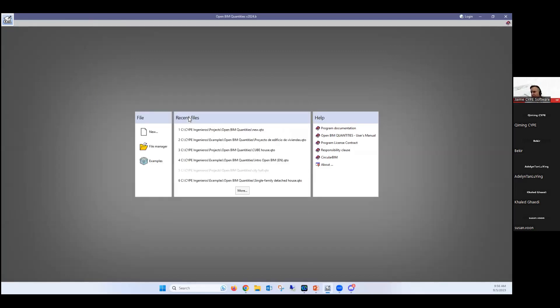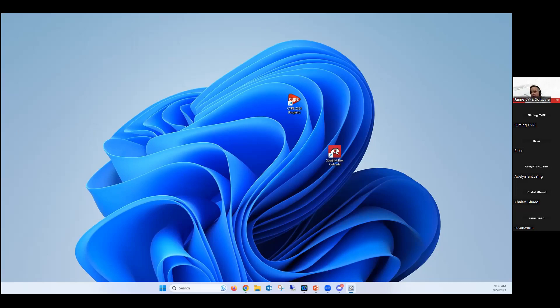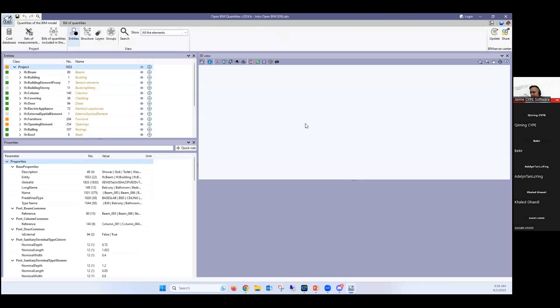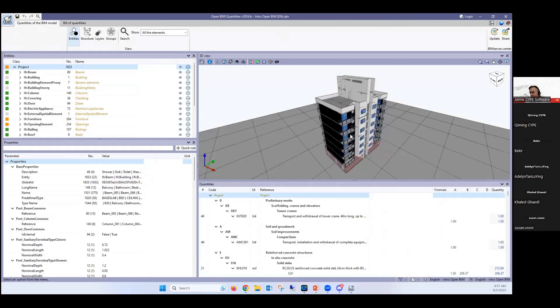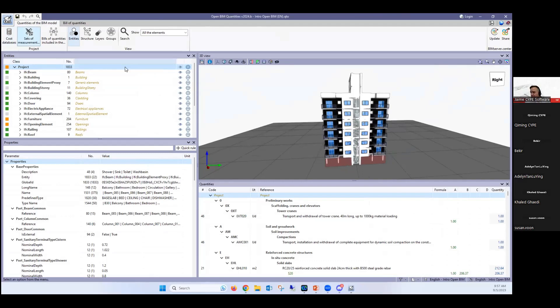I'm going to show you this example that I showed you previously of the building. But now keep in mind that we can also extract quantities from 2D drawings as well, not just from this. So it's a program that is quite simple and it just needs three things. One is going to be the model, which is the 3D model that you see here. Then it's going to need a cost database and then it's going to need a set of measurement rules.